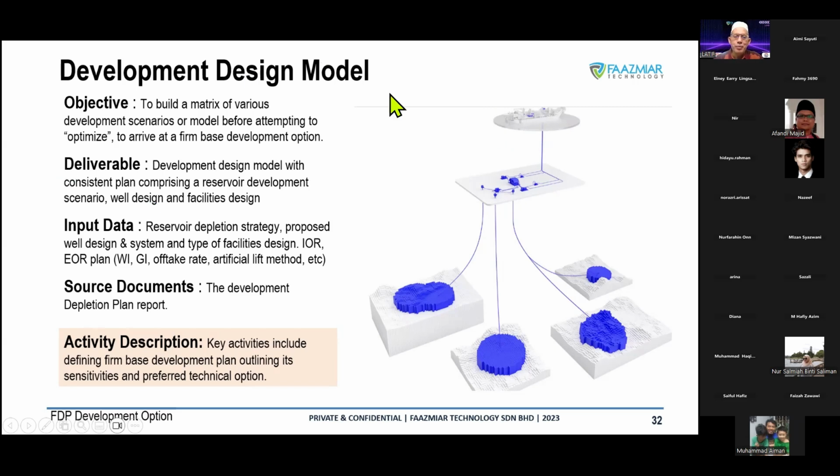So this is more or less the model. Either you go for subsea, or you want to set a platform. It's all based on the strategy. For example, if it is very deep, of course you cannot have the platform because it's going to be a very big platform, so much steel. It's going to cost you a lot. So with the FPSO, you have something that is mobile. After some time, for example after 20 years, you can still sell this FPSO to another operator, because you already used it for 20 years, for example.